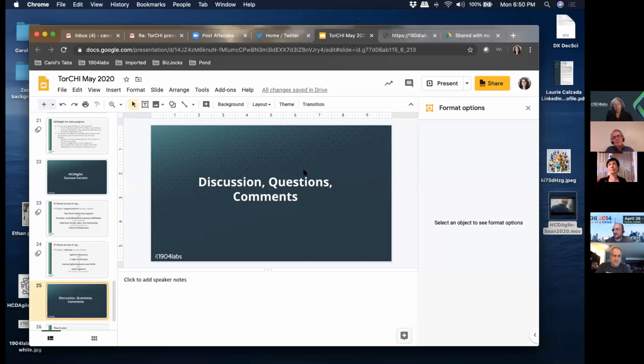But the reason we have a roadmap is our clients want to figure out, like, how long is this going to take? This is just reasonable. Even though they want to do Agile and they believe in Agile, they've got a timeline, they got a budget. So we're like, okay, let's understand what that is. We'll put together a roadmap, and then every month we go over that in real time with the client. We check velocity, we make sure everything's on track, we see if there's any change in the priorities and so forth. So it's a typical client meeting, but that always happens with the AEL, HCDL.